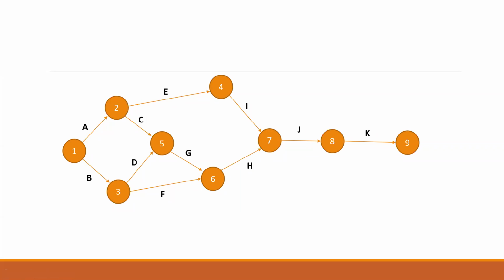Is this clear? Once we have given this number 4, and there's no more node which is not having any arrows coming in, then you hide the arrows from this node 3. So hide these 2 arrows, which is for D and F. So in that case, what happens? This one will not have any arrows coming in because we are considering this to be hidden here. So 5 will come here. Clear? Now when we hide the next one, this arrow, there's one arrow coming out of this.